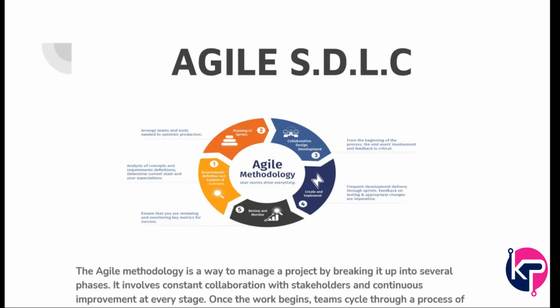As a team, we will go with the requirement first, which is the first step of the waterfall approach. Once the client has provided all the information about the project, we'll evaluate and finalize the requirement, then go for the design. The UI or UX team will generate the wireframe or a sample image of the project's look and feel.